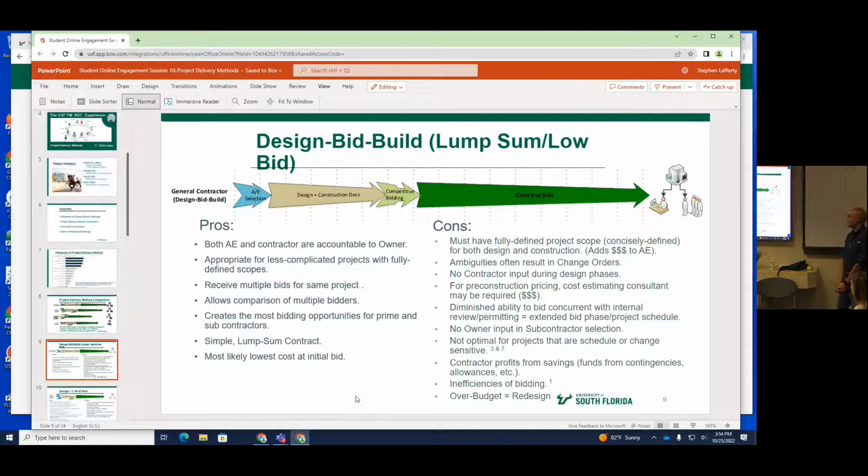This is also the most inefficient method of contracting because you have multiple general contractors. So we recently put a project out to bid like this. We had 8 general contractors. I think it probably took them $15,000 to $20,000 to bid that project. So we received 8 bids, and you've got 8 contractors spending $15,000 to $20,000 just on the opportunity to get that project. Now they've got to make up that money somehow. Hopefully they get it on the next project, but it means that they've got to increase their profit margin on that next project to pay for the overhead of all of their estimators.